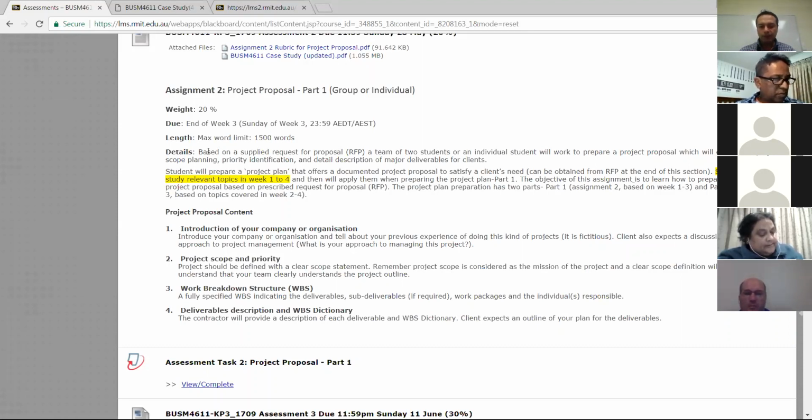Also, you will need to check the project scope statement checklist and fill in the parts that are necessary for the scope. Those could be milestones, the objectives of the project, exclusions and limitations, any assumptions that you have at this point in time, and other elements of the project scope that are already in the checklist.